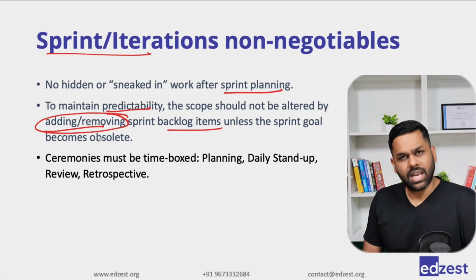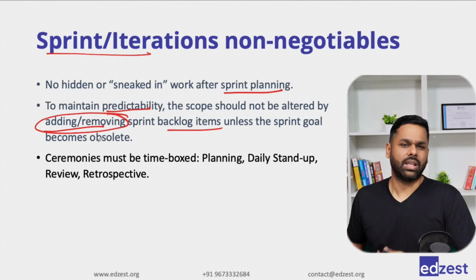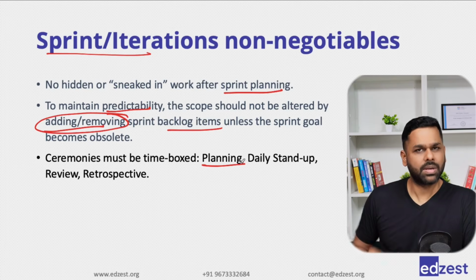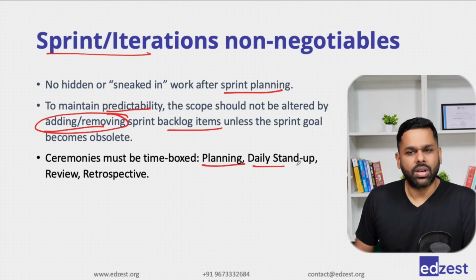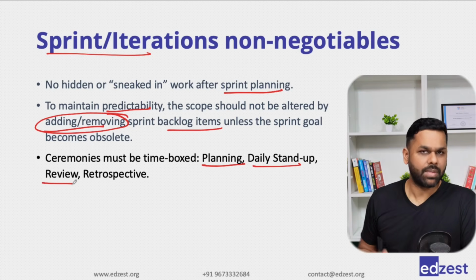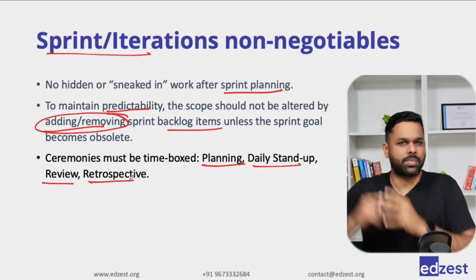Right? In Agile, you will do many ceremonies also, coming together and discussing something. One is the sprint planning itself before the sprint starts. Daily in the morning, preferably a 10 to 15 minute stand-up. A review after the work is done on what the team has developed, and a retrospective to see how we can improve in the next sprint.